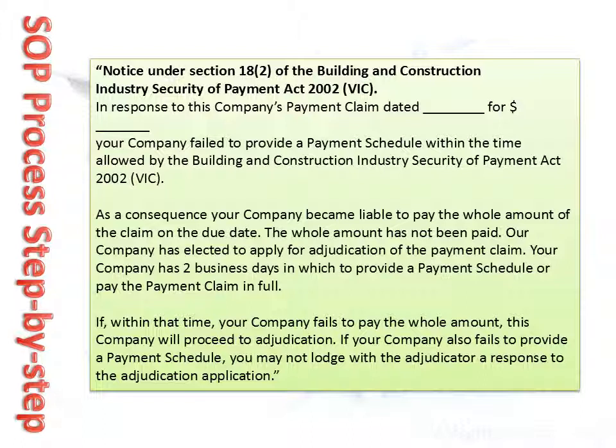If the client still does not serve a payment schedule, then the contractor may lodge an adjudication application and the client will not be entitled to serve an adjudication response. You can see why it is essential that you always serve a payment schedule.